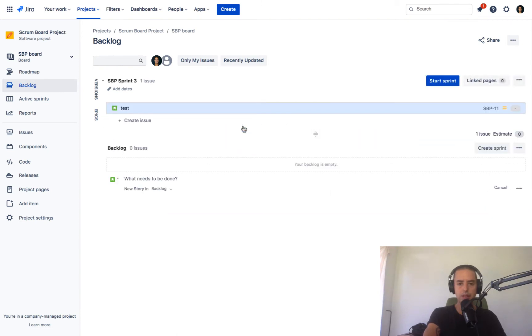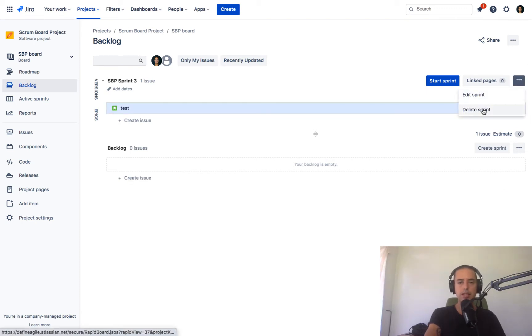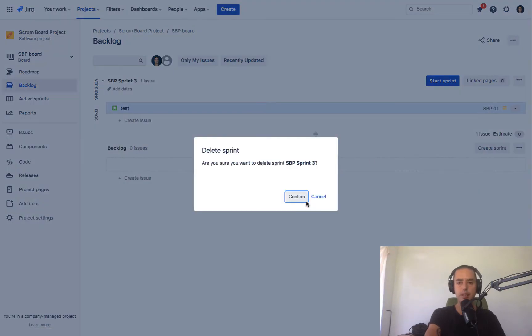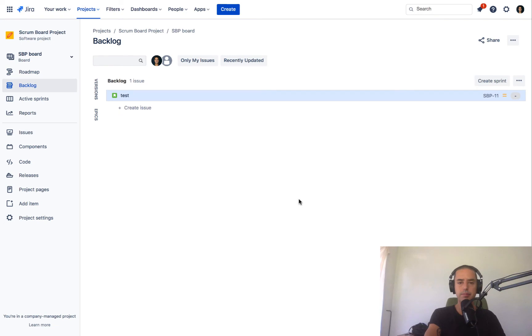But let's say we have this sprint, it's not started yet and you want to delete it. So you click on three dots, you click on delete sprint. Now let's see what will happen to a test story when we delete a sprint. Confirm. And it goes back to the backlog. So you're not losing anything.